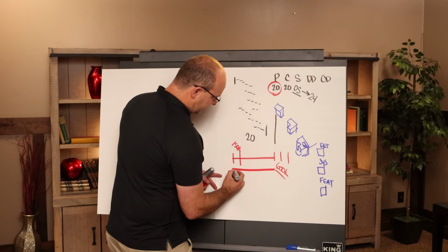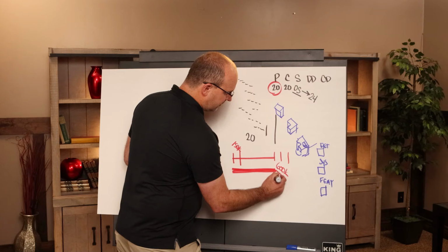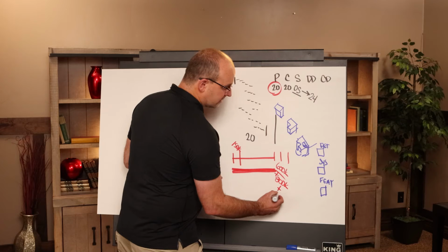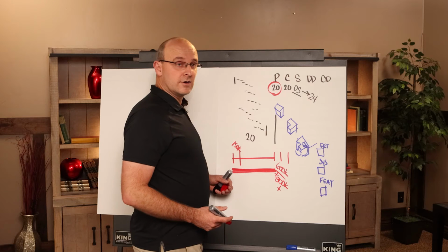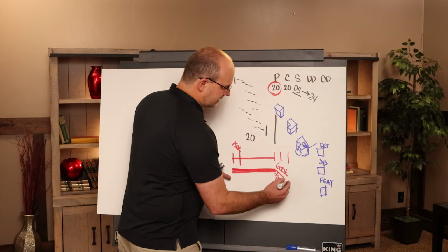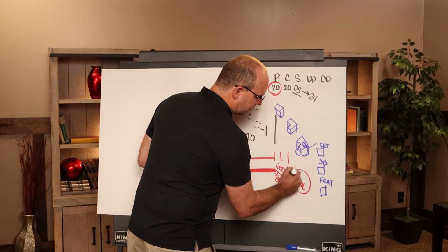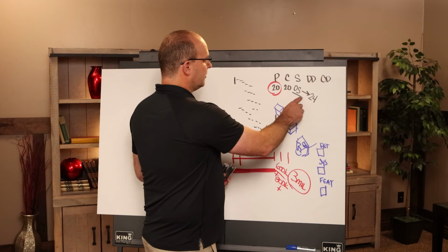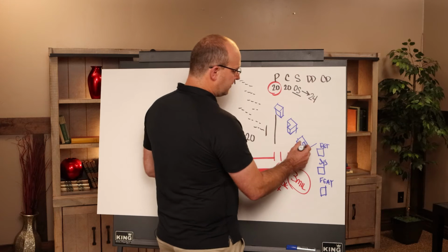Also, you have the general requirements, which consist of the trailers, the porta potties, the fence, everything else. So now you've got more. Let's just say that was 800,000. Okay, and now you've got other costs. Based on insurance, you might even have additional monies that are owed from an interest rate standpoint. You've got delayed occupancy. So you've got these really big problems. Let's say at the end, now you've got a $3 million problem, okay? Because you estimated the wrong time early on, and now you have your oh-no moment, and now it's really 24 months.